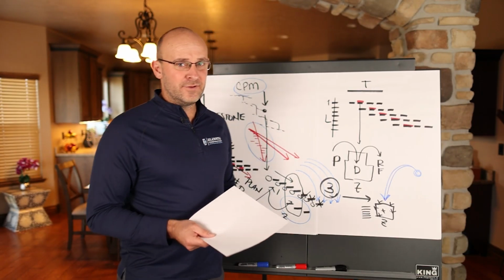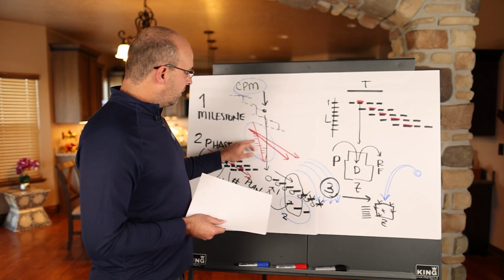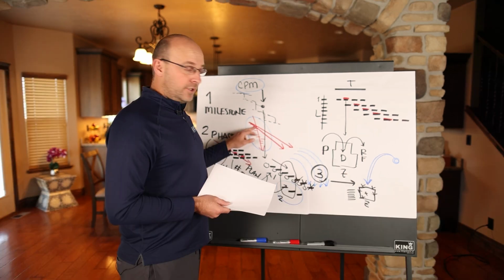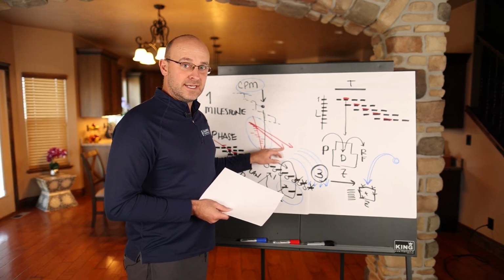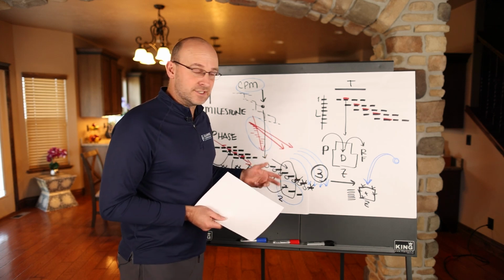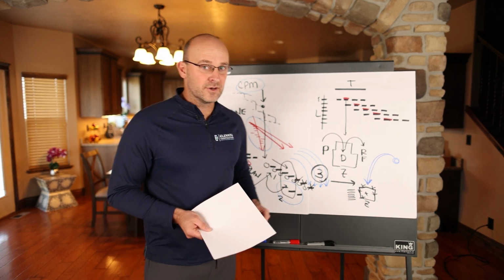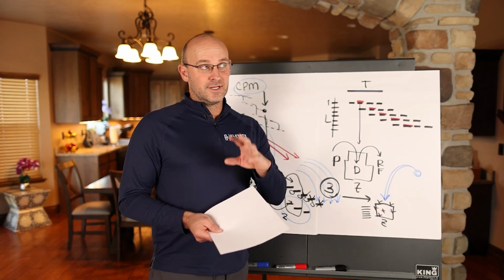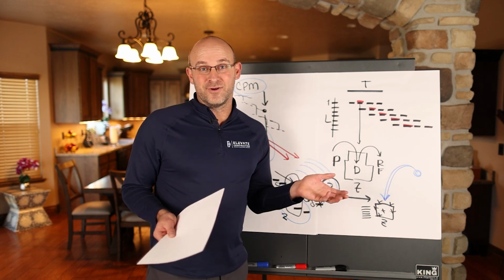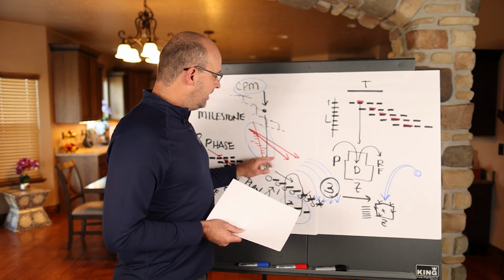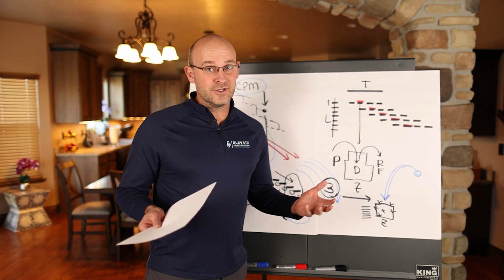Here's the key. If you're a trade partner and you go attempt to do this stacking, you're not only not going to hit the date that you should, which is past what the GC wants, you're going to extend longer and hurt the job. So you're, I'll say, darned if you do and darned if you don't, right? If you do what they say, you're going to tank your effort and you're going to look bad, they're going to be mad.